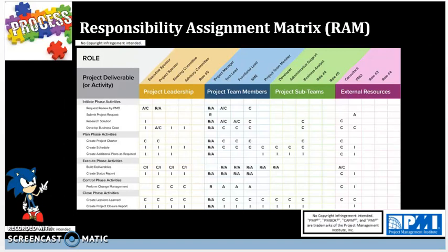Keep in mind that there is only one accountable person for each requirement in the project, but there are multiple responsible people and multiple consult and inform individuals, but only one accountable person, and that person is solely accountable for the success of that part of the project requirement. That's really important to understand what that means. And typically the test questions will revolve around the RACI matrix and RAM regarding scope and the requirements traceability matrix. So requirements are crucial. Keep that in mind.